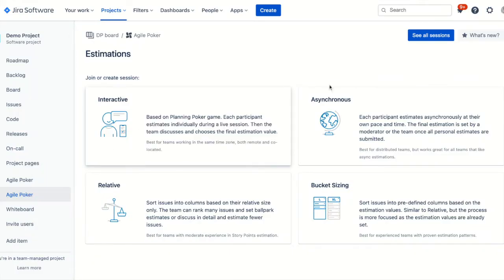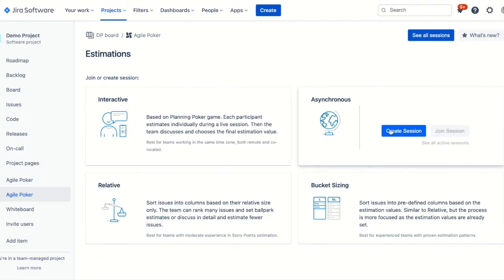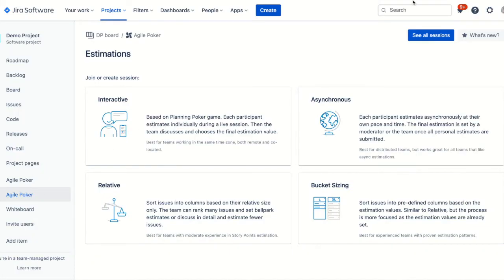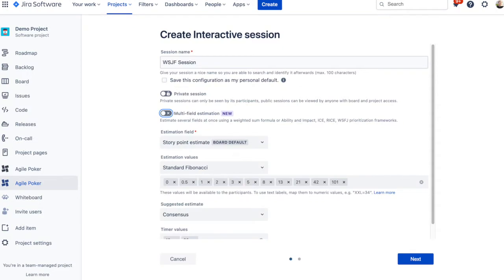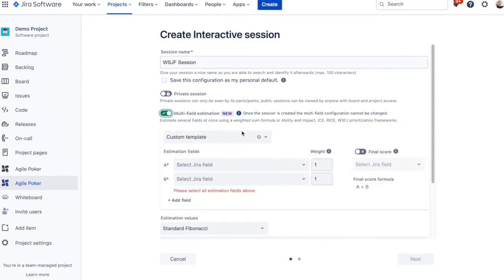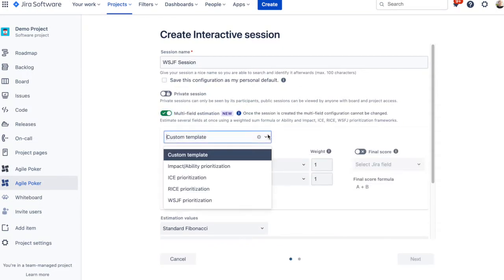Create an interactive or asynchronous session of Agile Poker in Jira. Choose one of the predefined templates and select Jira fields for estimation.